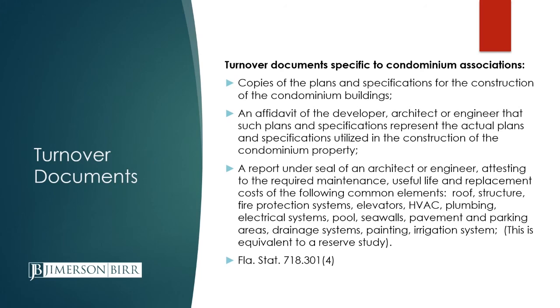The developer has to provide an affidavit of the developer, architect, or engineer certifying that such plans and specifications represent the actual plans utilized in construction in the condominium. So they've got to certify that those plans and specs were not as planned, but as built.